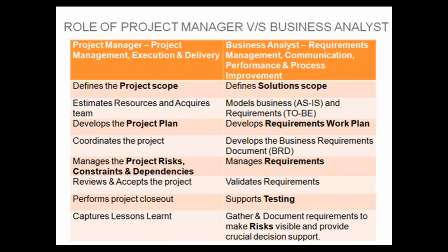What if there's going to be a natural calamity in that region where the project is getting implemented? Heavy snowfall. The project is getting implemented during the winter season. There's going to be heavy snowfall. Who's going to manage that? Employees are not going to turn up to work. They won't come to the office. They can't come to the office. And if there's heavy rainfall and flood in that area, internet connection will not be there. Power connection may not be there. What will you do? So alternative arrangements of employees in different geographic locations should be made, along with constraints and dependencies.